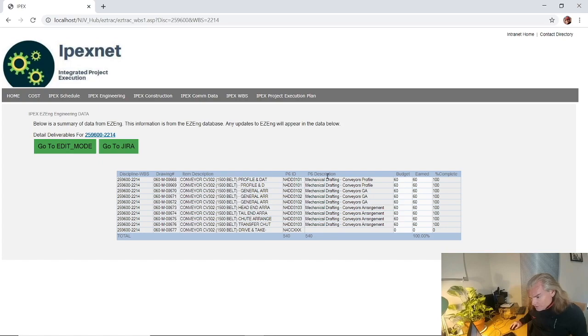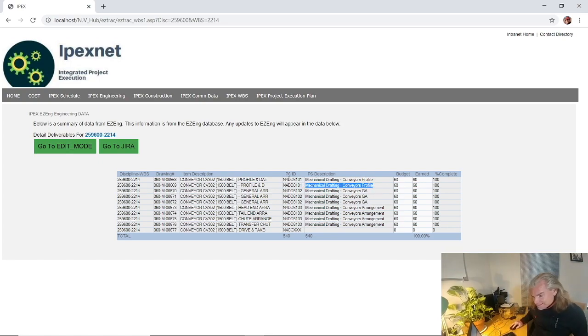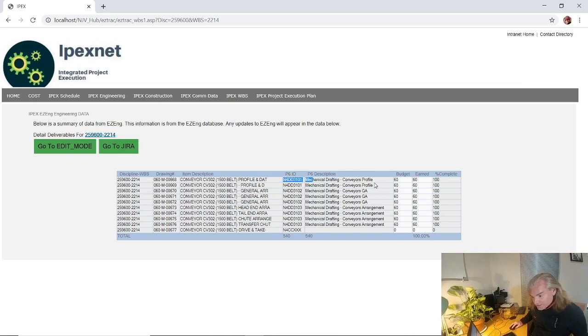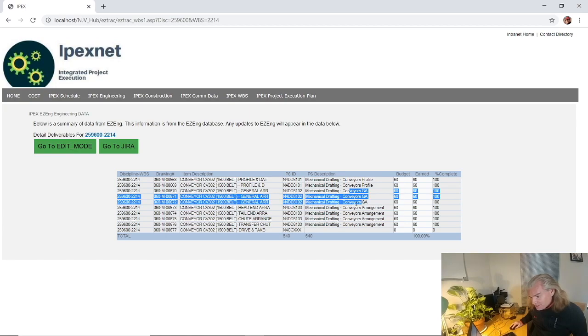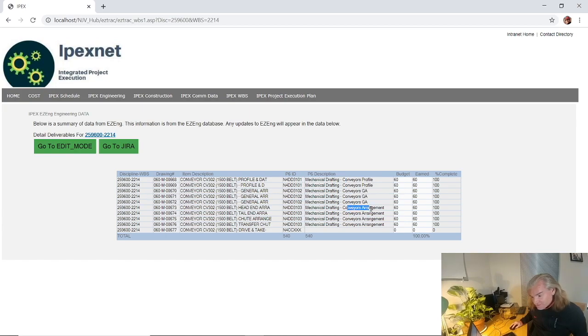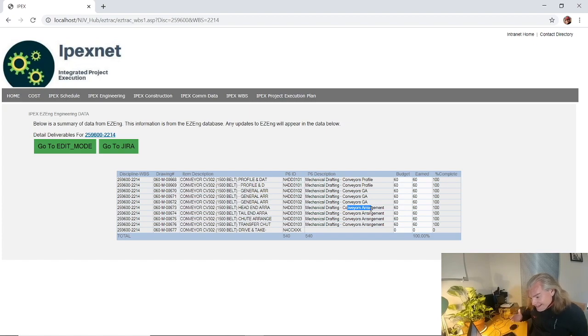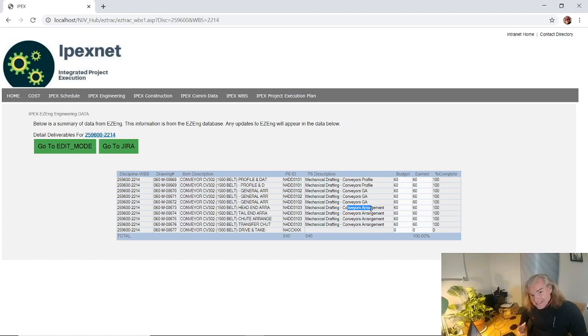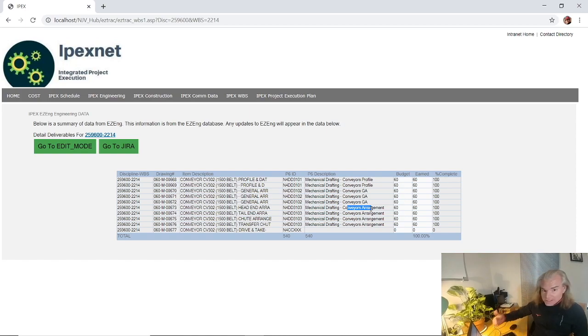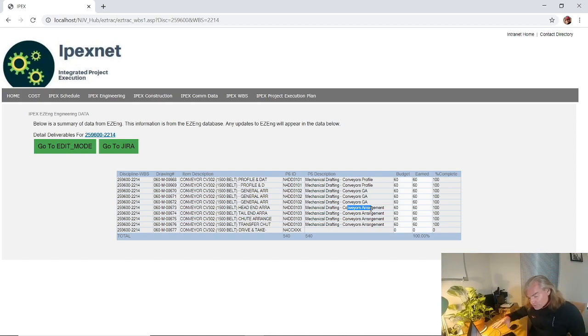When I exit the mode, there we go. We can actually see that there's a P6 unique ID and the schedule ID description. So that's the conveyor profiles, here's my general arrangements, and here's just conveyor arrangements for the other items. That right there is just data integration at its absolute finest. Now I could be pulling in a finish date for these activities. Haven't done that, you could do it pretty simply as well.